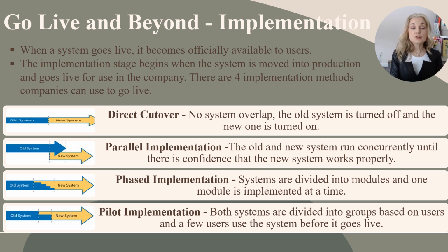So one strategy is a direct cutover, and think of this as turning on a light switch or a computer. It's either powered on or off. There's no overlap between the old system and the new system. The new system starts running and the old system is gone.